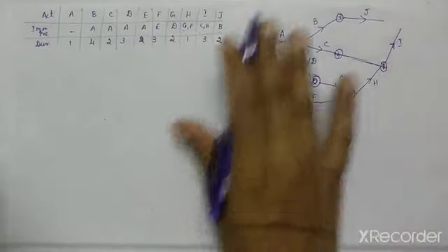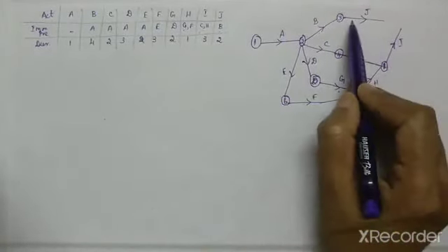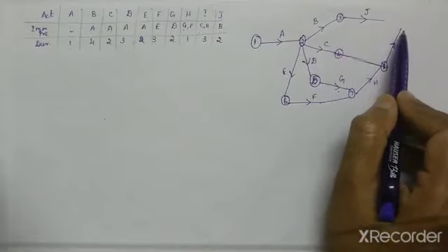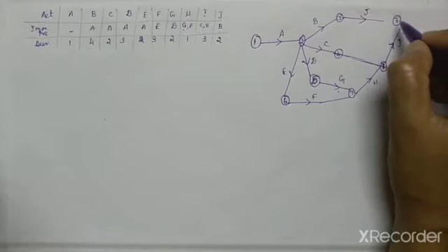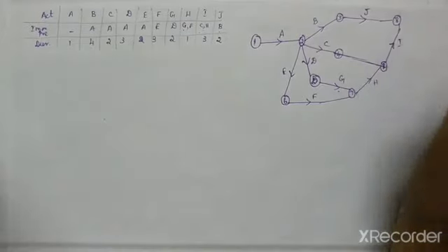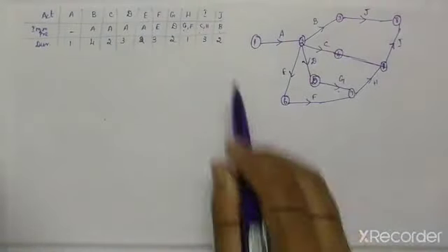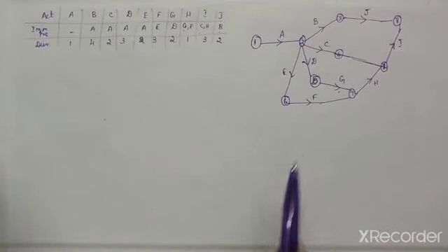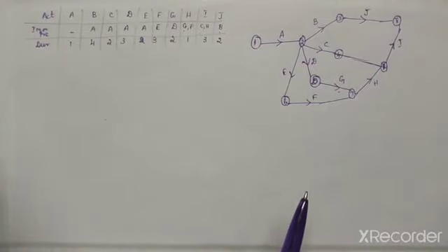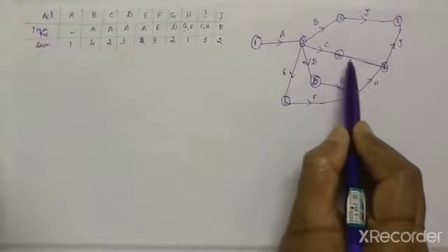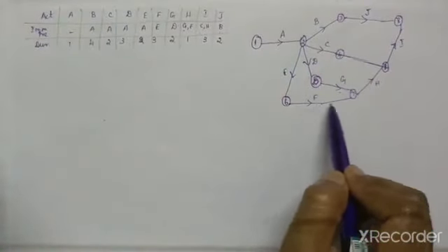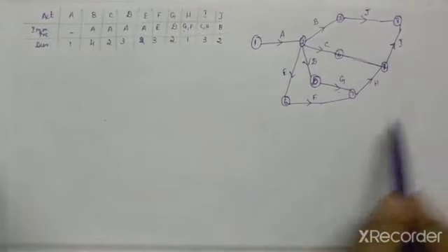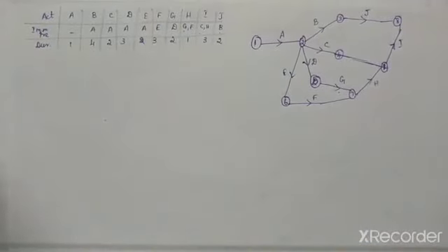That's all. So this is your network, but here the J activity and I activity will be separated, so you have to join like this. You have to put one dummy activity, that is your 8th activity. So this is your network. Now we have to substitute the duration. For finding the critical path you should avoid the dummy activity. So this is your complete network.